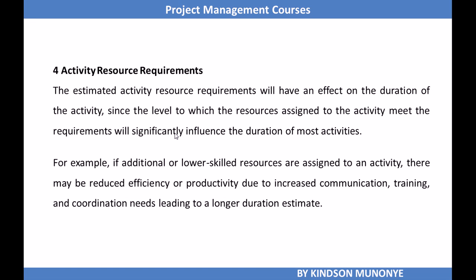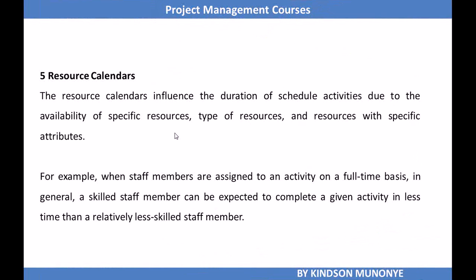Alright, so let's now look at resource calendars. Okay, this is very important because resource calendars influence the duration of activities, because the availability of specific resources, types of resources, and resources with specific attributes might be taken into consideration. For example, when staff members are assigned to an activity on a full-time basis, in general, a skilled staff member can be expected to complete an activity in less time than a relatively less skilled staff member.